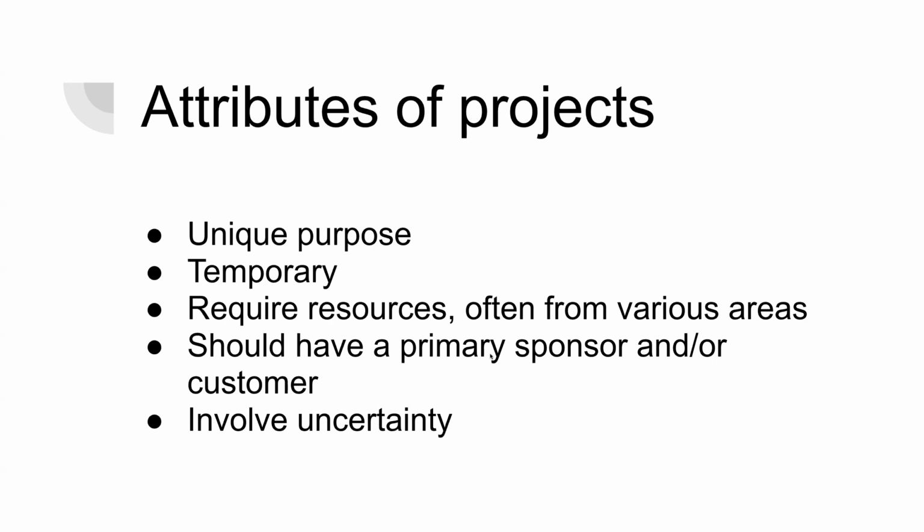If you need to get something done, we might need to hire some people and get them on board to get this thing done in 1 month. Okay, we need to get some already hired people from a different project to this one. In that scenario, most of the time the people would not get the context. Sometimes the languages are different. Somebody is doing Java, this project is in JavaScript, and the language difference might come up, and they will make errors in a lot of places, a lot of the time.